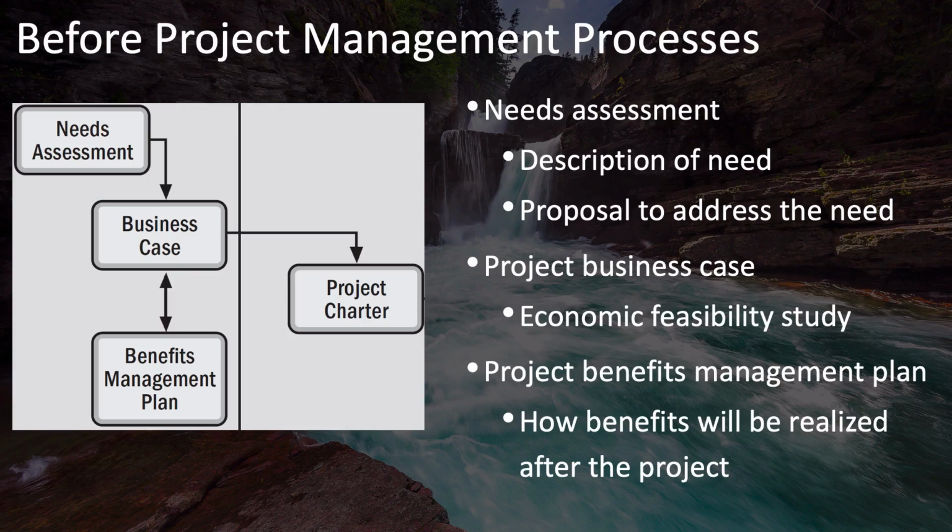These start with the needs assessment first, which is used to develop the business case, and the benefits management plan is used to update the business case. The business case is then used to create the benefits management plan, which may also feed back to and update the business case, which in turn is a major input to the project charter, which is where the PMI processes begin.